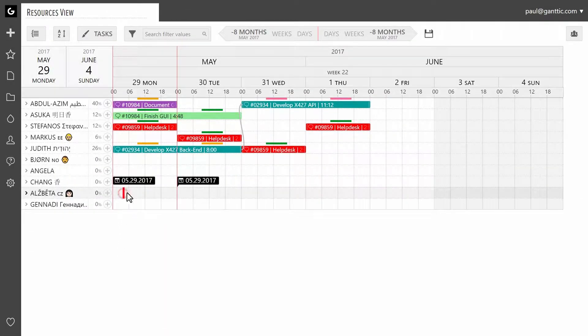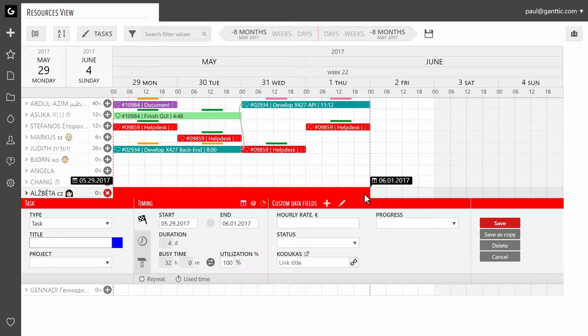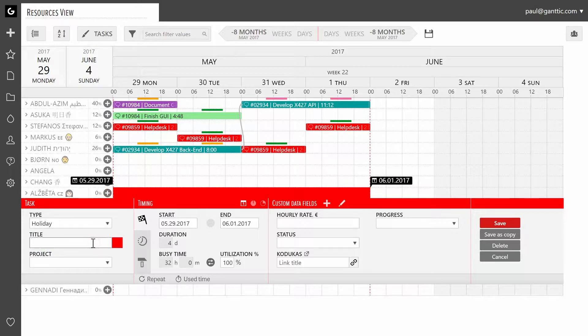First, schedule a task with the length that you want the holiday to be. In the task dialog, select holiday from the task type menu. Give the task a name. We're going with annual leave.